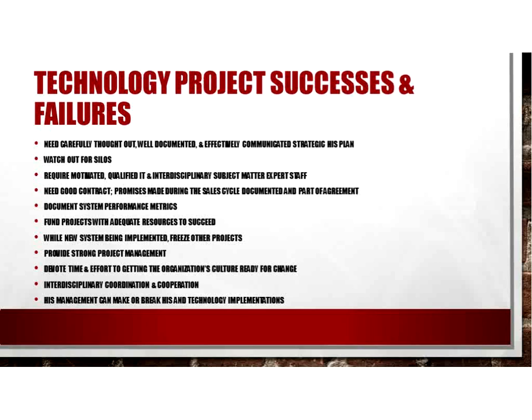So you lay out those milestones and what percentage of payment they get according to when those milestones are accomplished. If that vendor is not going to agree to the milestone-based terms in your negotiation, then you might need to shift your discussion to your second acceptable vendor.